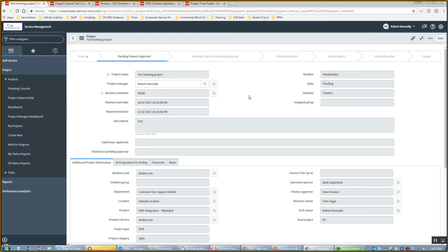But if a contractor requests access to the time portal and they are not on that list, what that means is that procurement doesn't really know about them at all. They are not on any statement of work that procurement is aware of. So in that case, their request to be added to the time entry portal will be denied. Procurement will be notified, and then the project manager needs to work with procurement to get them recognized.